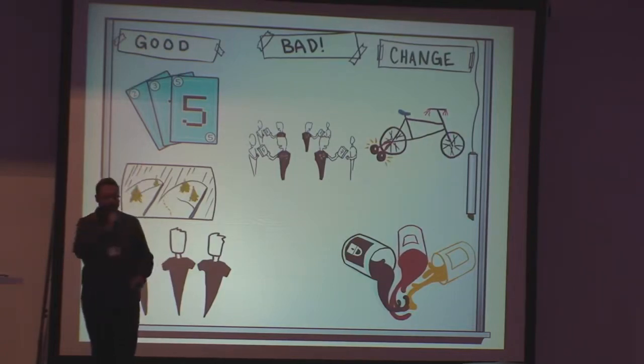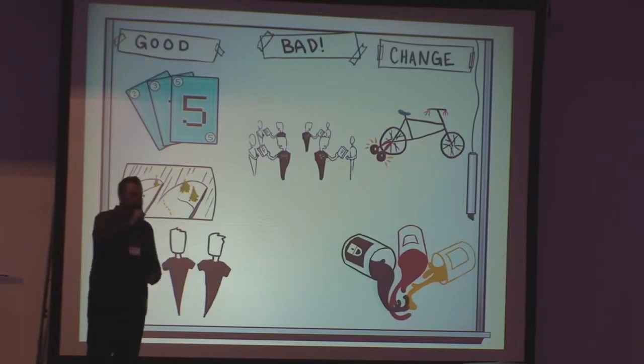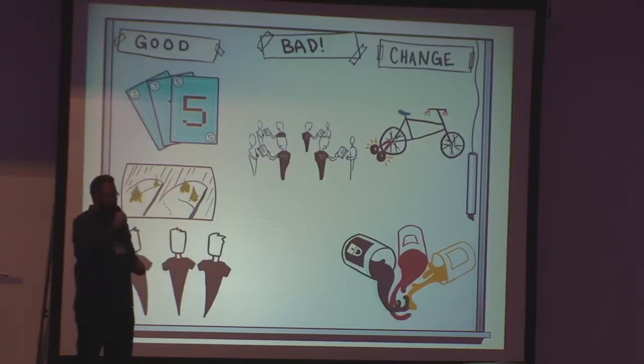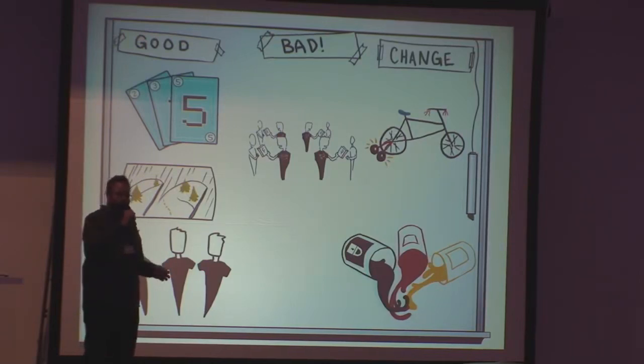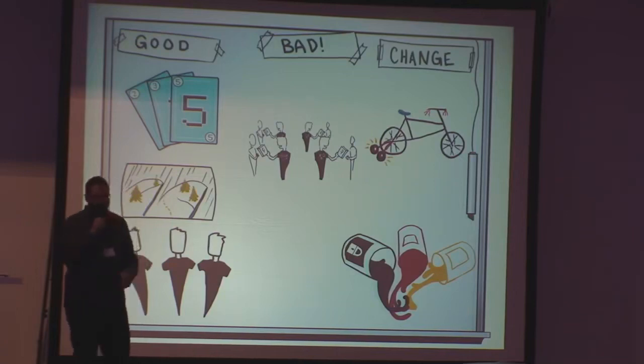We had better visibility here, both for ourselves and for the rest of the team, by virtue of the fact that we were tracking things the same way the development team was tracking them. So this was better organization for us, as well as more transparency for them, so that they knew the security pieces we owned were tracked in the same system, in the same way they tracked theirs, and they could see what we still need to do, what's actively being worked on, and what's already done.